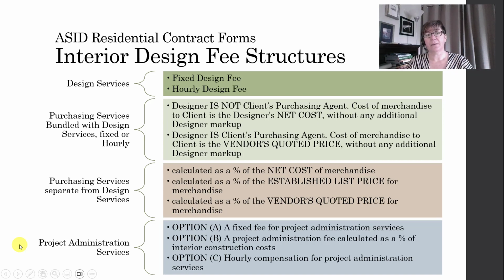Let's talk about design services first. You could charge a fixed design fee or an hourly design fee, and there are many different ways for calculating which is appropriate for your projects. The purchasing services, I've split into 2 categories. You can either just bundle them up with your design services, in either a fixed design fee or an hourly design fee, or you could separate these out and have a separate fee structure for purchasing services.